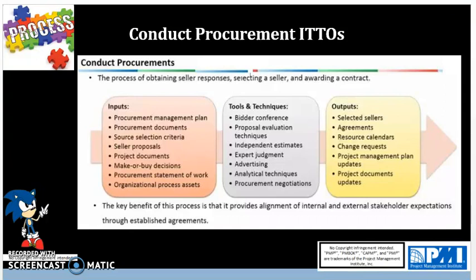This is only specific to each procurement and is developed from scope baseline, which is defining the procurement in detail for the sellers to determine if they can provide the services or not. The procurement statement of work has various components such as specifications, quantity, desired quality levels, performance data, period of performance, and work location.